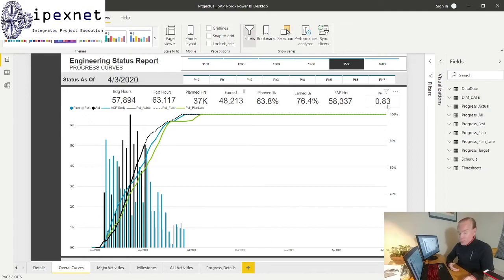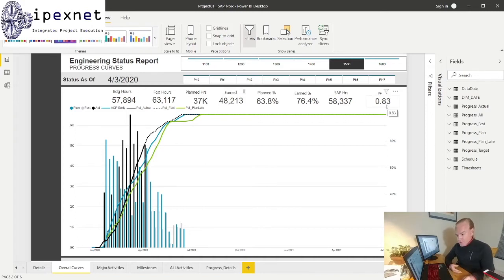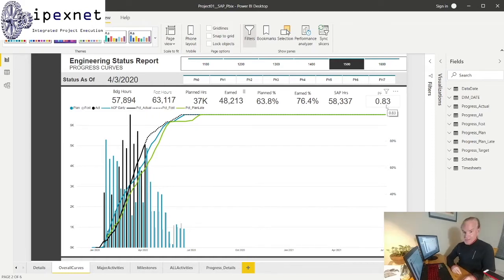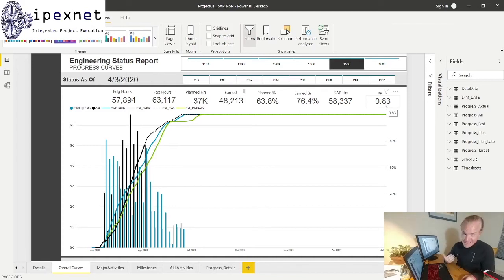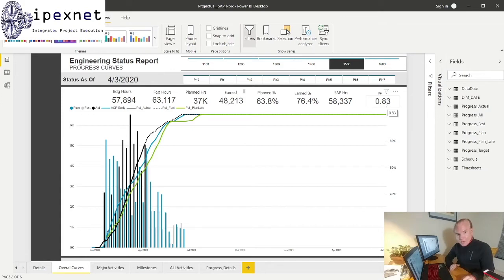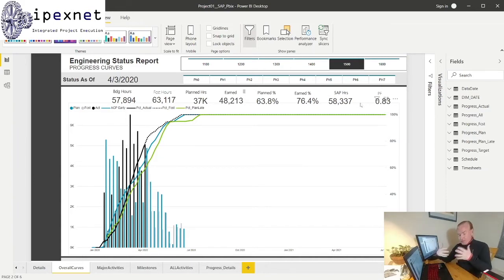It's like a productivity factor and that is where a lot of power is. Understanding are you getting value for the hours that you have? Sometimes you can be well behind schedule but you could be spending maybe no hours at all, and so maybe the value that you're getting from your man hours is a lot. In this case, point eight three - that's actually below the line so it'd not be very good. But I want to go into more how I've done this, how you can get these values in here. It all relates to the key of how you're going to link together your progress and how you're going to link together your timesheets, because that's really the integration - how do we achieve that?